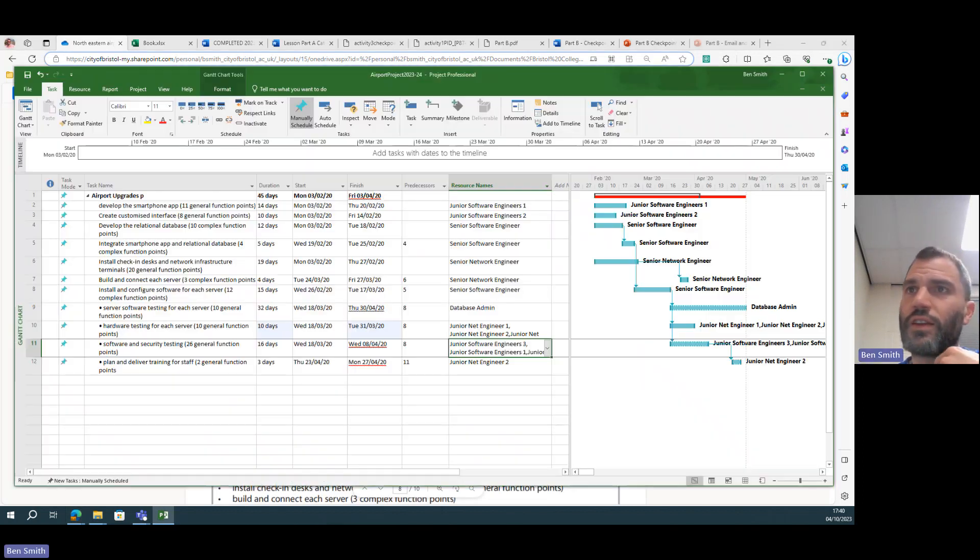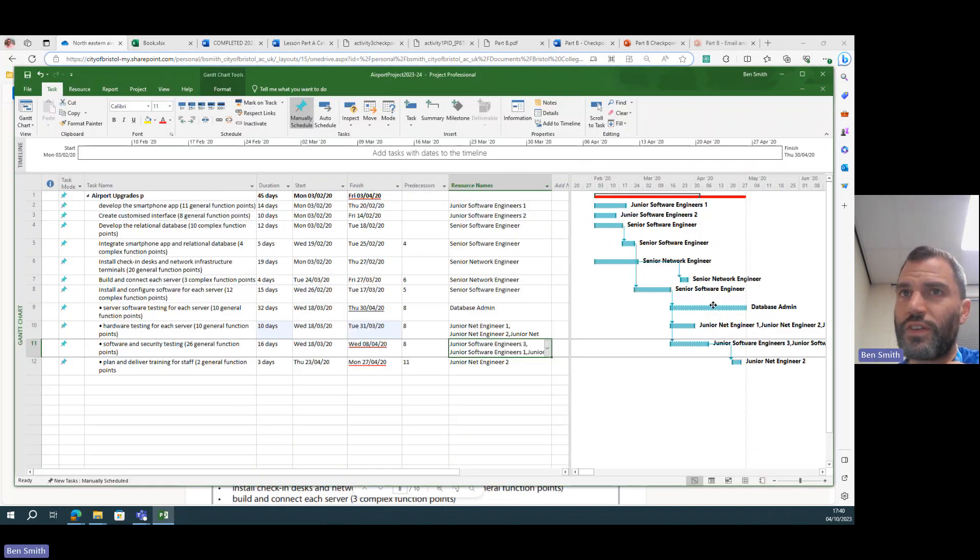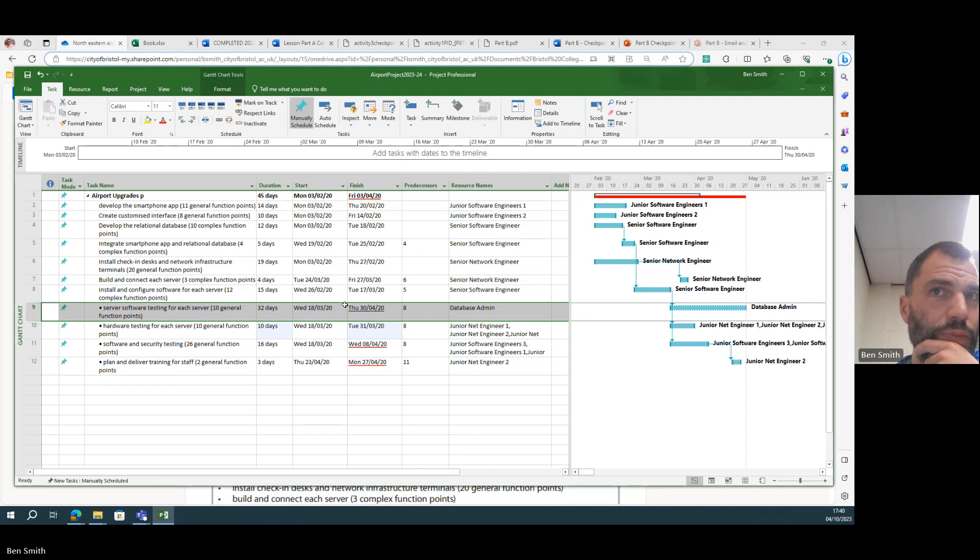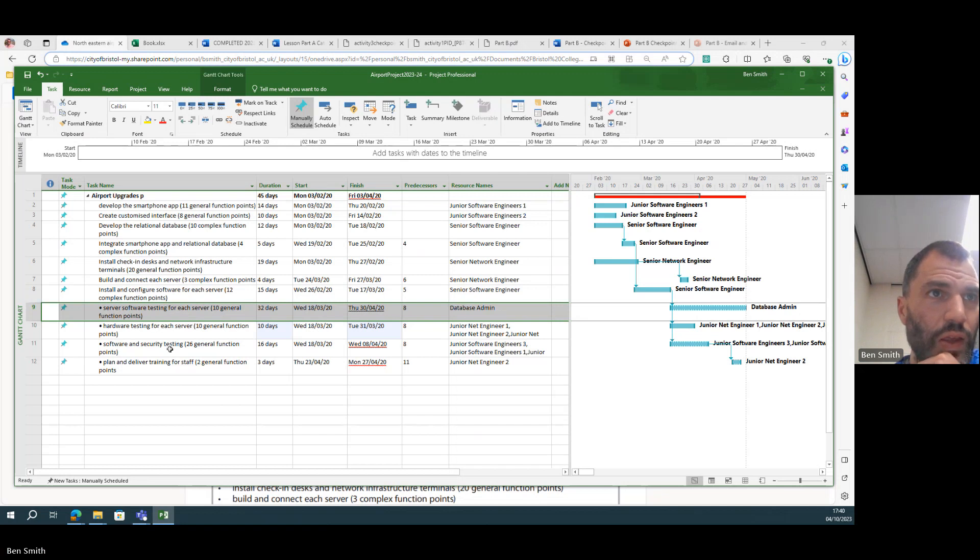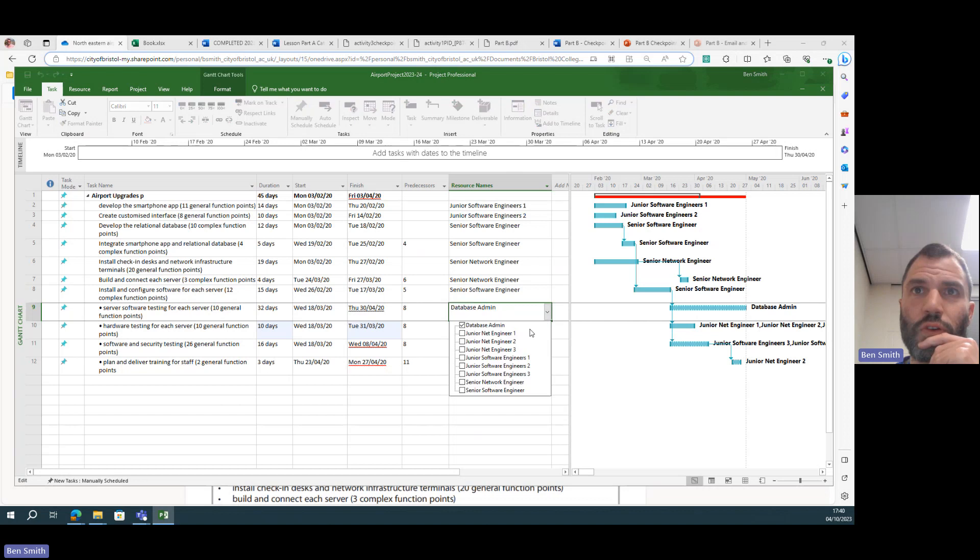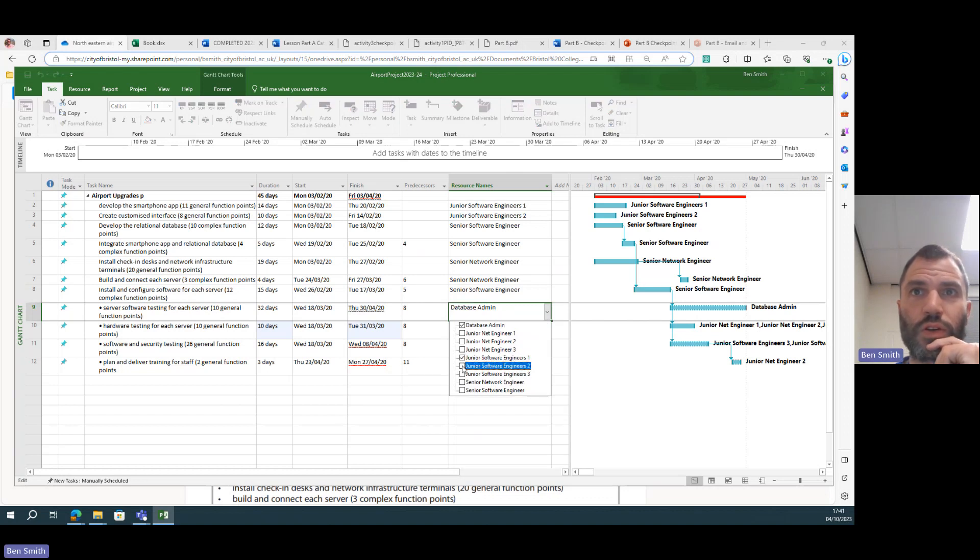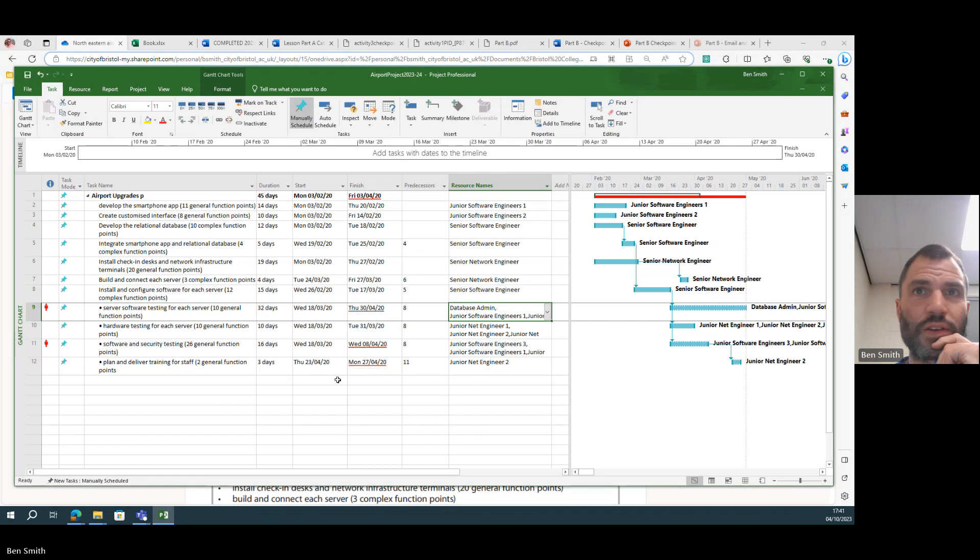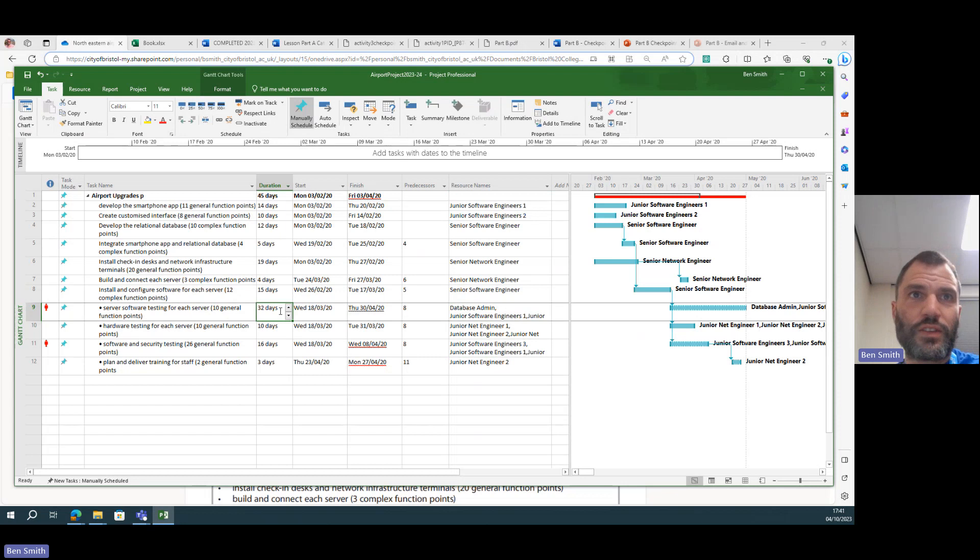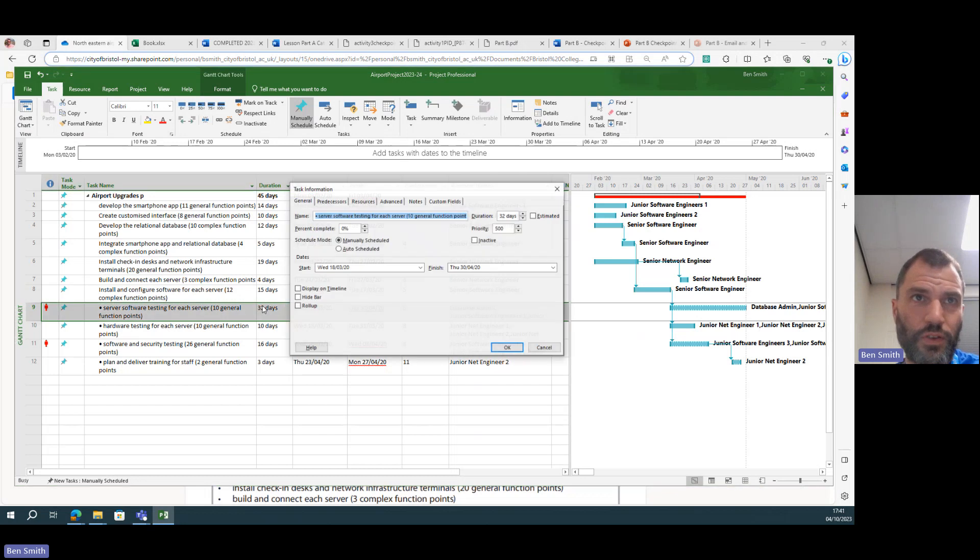So I need to cut this task down here that's currently just assigned to the database administrator. Perhaps if I use junior software engineer one and two on there.